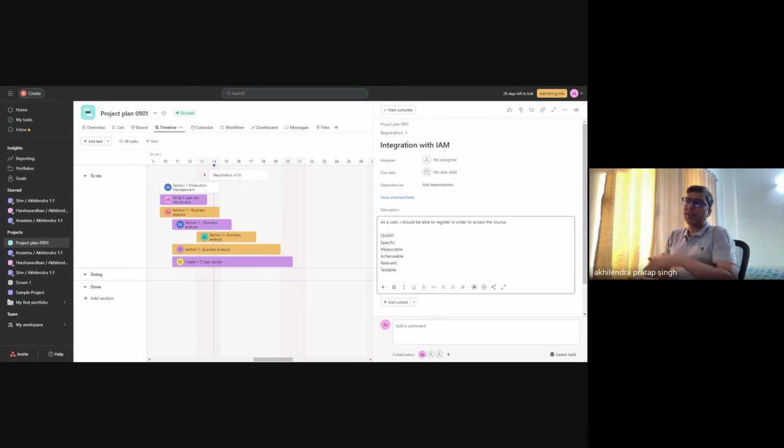So when I'm accessing Asana, it will have many logs. Now within those logs, they might be entering all kinds of information. Now, if I cannot test it, then there is no point in writing that user story. So always, your user story should be something which your tester can pick and test. It's a very important point, and always pay attention. So this will become your user story. Then you should have acceptance criteria.